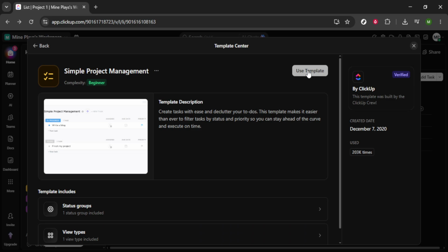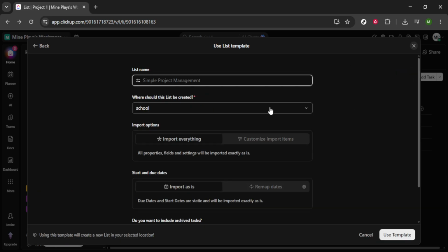Don't forget to review the automations. Ensure that notifications, status changes, and due dates behave exactly how you expect them to. We want everything running like a well-oiled machine. Take time to configure your views, list, board, calendar, and Gantt to ensure that the most important summaries come up first. If tracking time is on your agenda, make sure that feature is activated at either the space or list level.